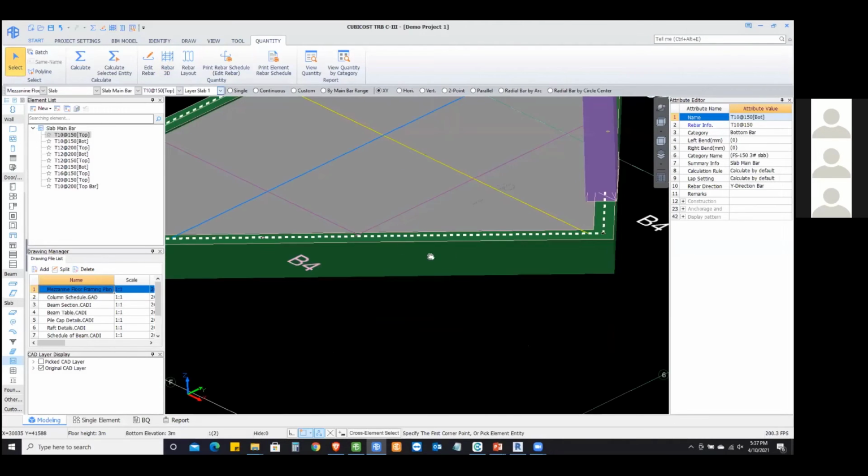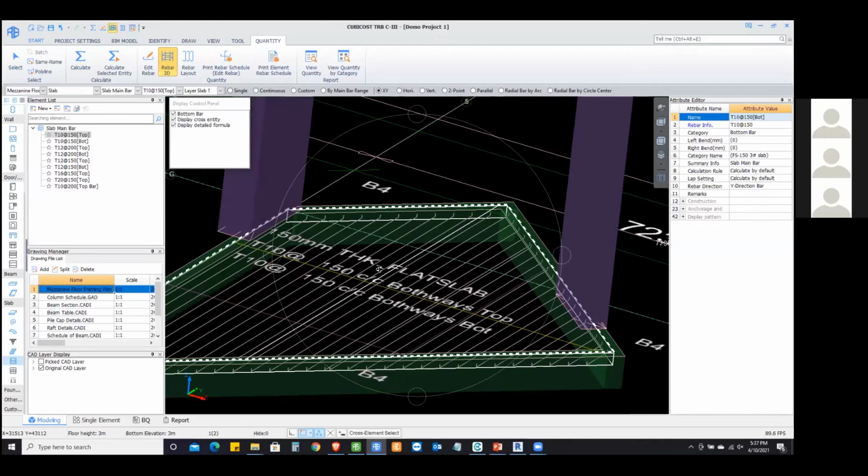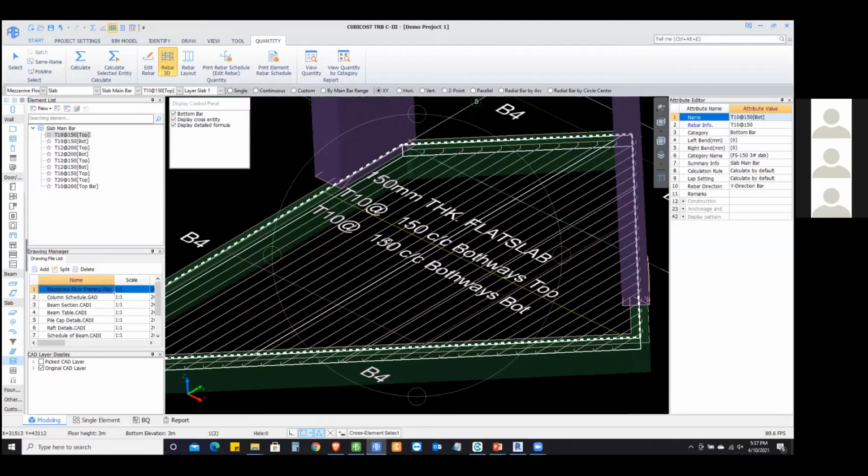And this bending, the hook, and all of this information, anchorage length, lapping, or any connection setting, coupler, this stuff comes from the rules of measurement that you have chosen, or the rules that you are applying. So we'll look into details of that in a while.